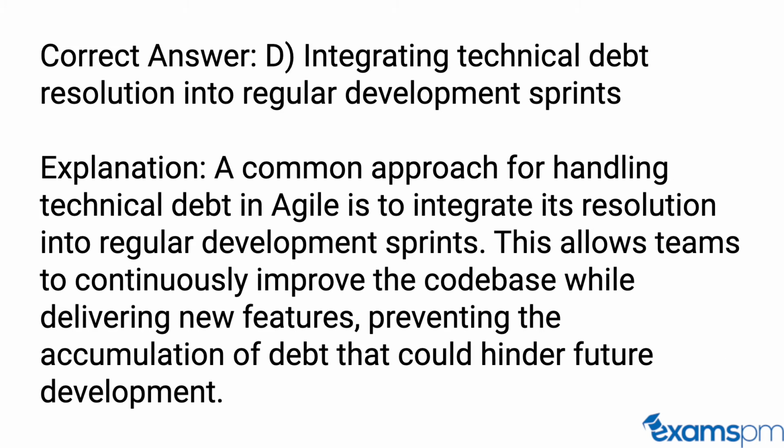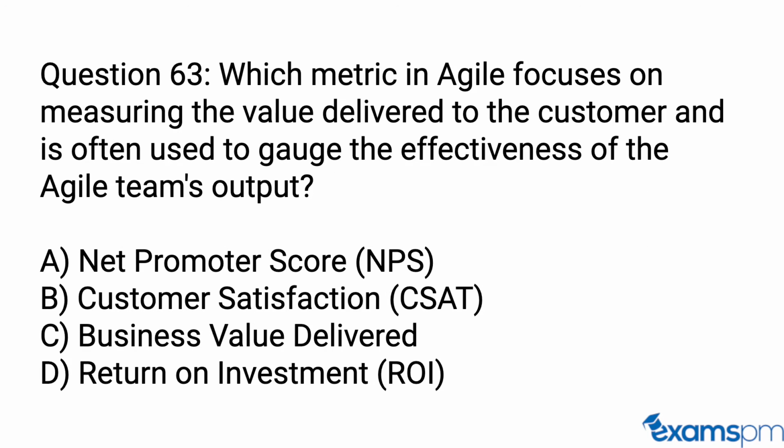Correct answer: D. Integrating technical debt resolution into regular development sprints. Explanation: A common approach for handling technical debt in Agile is to integrate its resolution into regular development sprints. This allows teams to continuously improve the code base while delivering new features, preventing the accumulation of debt that could hinder future development.